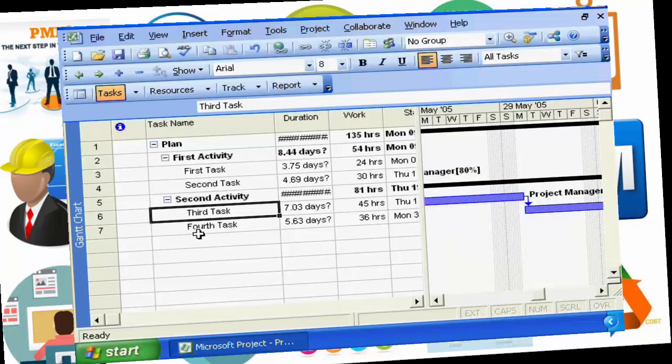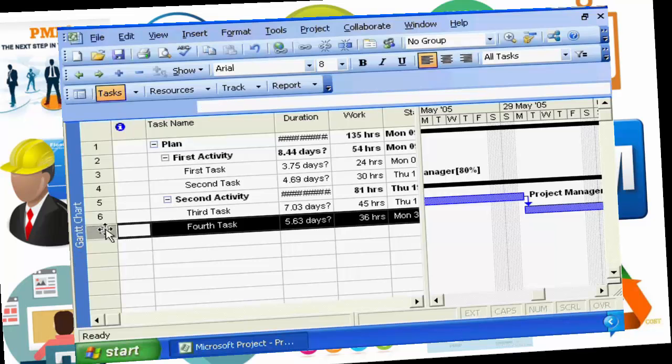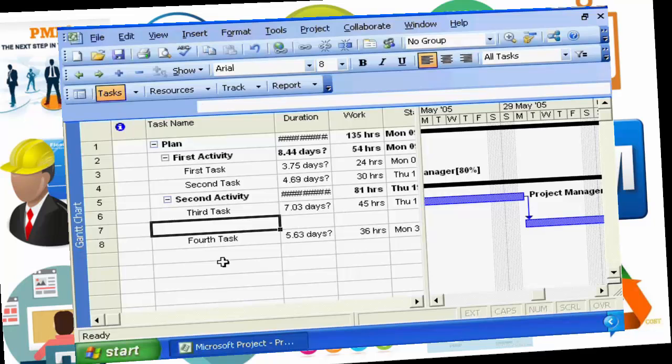As you're going through and developing your work breakdown structure, you may have missed a task in your original data entry. If you need to insert a new task into your project, you simply go to the following line, hit the Insert button on your keyboard, and a blank line will be created in your Microsoft Project plan itself, and you can say this is an added task.